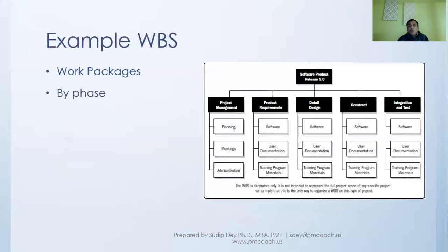Sometimes you can break it down by phases. For example, in this particular one, we have project management, and then all the others: requirements, design, construct, integration, and test. They are the phases in the life cycle of the project. At the second level, we have taken the phases.